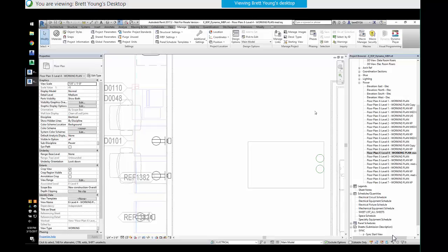You probably save at least a half a day per floor, per 50 pieces of equipment, I would guess. So this project that I'm looking at here has 6 main floors of equipment. So every time you run it, throughout the life of the project, maybe. So that's only one time though. Every set. So at 100% DD, you have to run this and make sure you covered all your pieces of equipment. You run it again. So it's probably 4 hours per set per floor, as my guess.